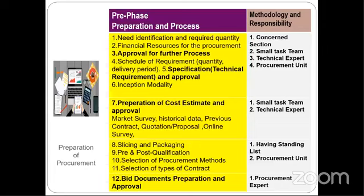We need to make the cost estimate. The mechanism for this includes: a market survey, historical data analysis, a previous contract, a quotation or proposal, an online survey, or other different ways.